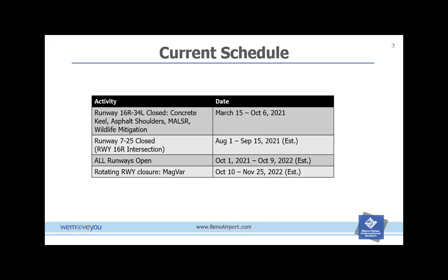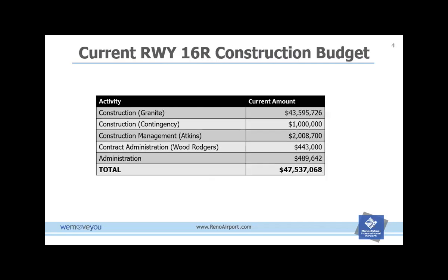We'll do one runway before 16 right, open it on November 3rd, immediately close the parallel runway and change that. Meanwhile, the crosswind runway has to straddle that closure date, because you need to get the intersection of runway 16 right, then you need to grab the intersection of runway 16 left. So that kind of straddles that closure date. So it's a little tricky there, but I think we've worked through it and are ready to go on it.